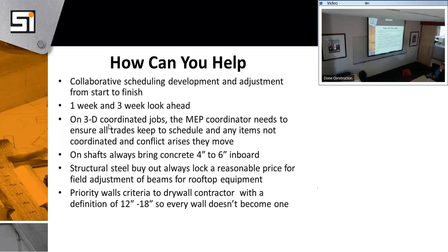So what's helpful is doing a pull schedule. I don't know if everybody knows what a pull schedule is, and I don't think you use it very much here, but we are going to use it on the B47 job. If you're interested in attending just to watch it, it'll probably be good for you. What I find is, we get on a job, and the superintendent provides a schedule from his interpretation of the project, but without a lot of detailed input from mechanical, electrical, and other subs.